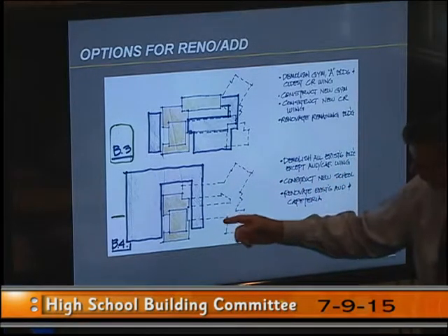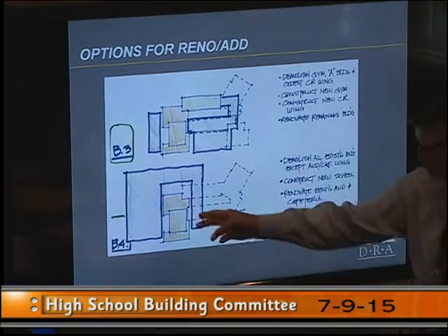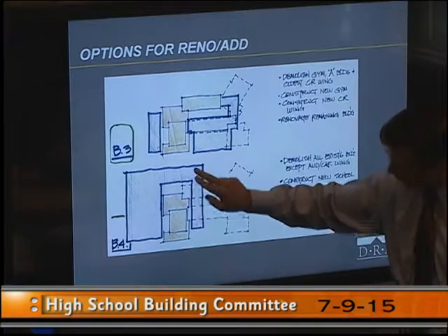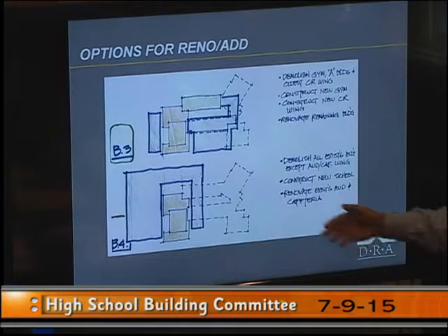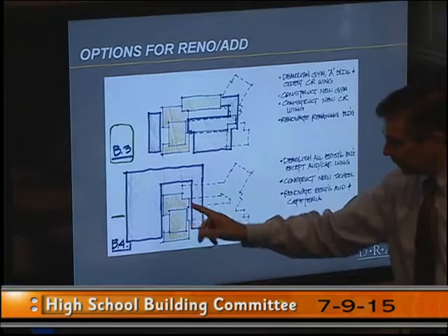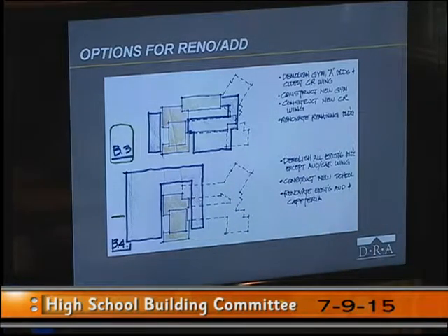But in this case, you have raw ends of the building. If you demolish these wings here and don't put new construction there, you have to do something. That building is the newest building, so when it was built, it doesn't have exterior enclosure at those points where it joins. But those are generically 4 addition renovation options we think deserve further study, and the MSBA would agree, I believe, on that.